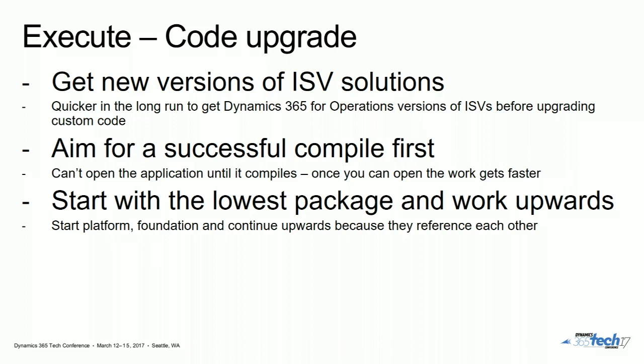Even what I see a lot of people doing is just one dev will work on it to start with to get it to build, because it's relatively limited what you can do when you can't open the application. And then once it compiles at least, then you can open it out to a bunch of people to work on different areas.